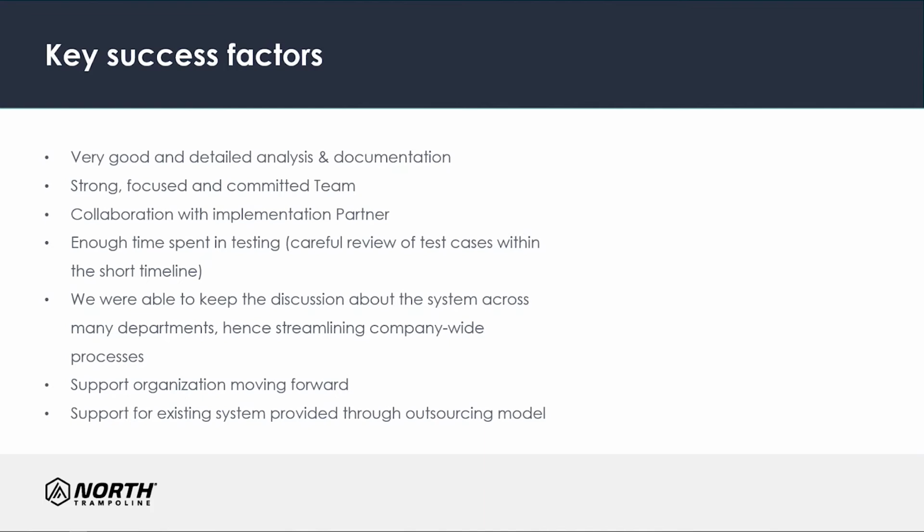Great. Thank you, guys. Let me add one point to this discussion, because we were concentrating on providing a new online system, but at the same time there was a legacy system, Dynamics NAV 2015, whose support was actually based on one pillar. That was an experienced key user who in fact quit at the beginning of the implementation of BC Online. And this was a challenge and a risk that we had to address together.